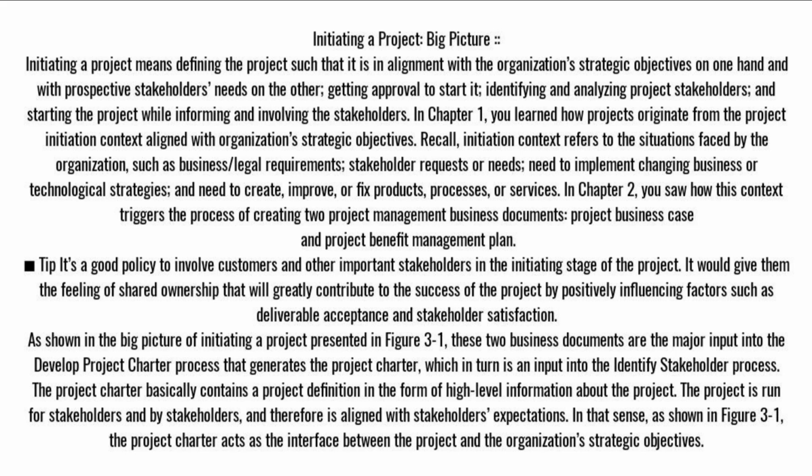As shown in the big picture of initiating a project presented in Figure 3.1, these 2 business documents are the major input into the develop project charter process that generates the project charter, which in turn is an input into the identify stakeholder process. The project charter basically contains a project definition in the form of high-level information about the project.